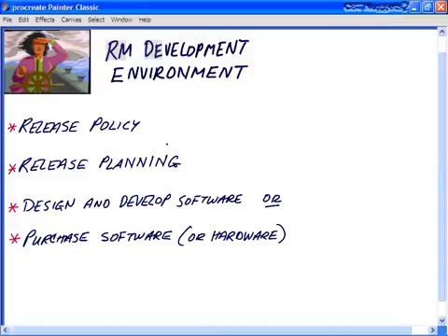This process is known as release identification. You'll also determine during the release planning process what level the configuration items can be independently distributed of each other, these release units. Do they need to be released as a package, or can they be released independently? You have to evaluate during the planning and design and development the potential impact of the release, how many person hours it's going to take, the life cycle of the process, how difficult the installation on the production side and the impact on the end user. Also the complexity of dependencies between software and other software, software and hardware, and the overall IT infrastructure.